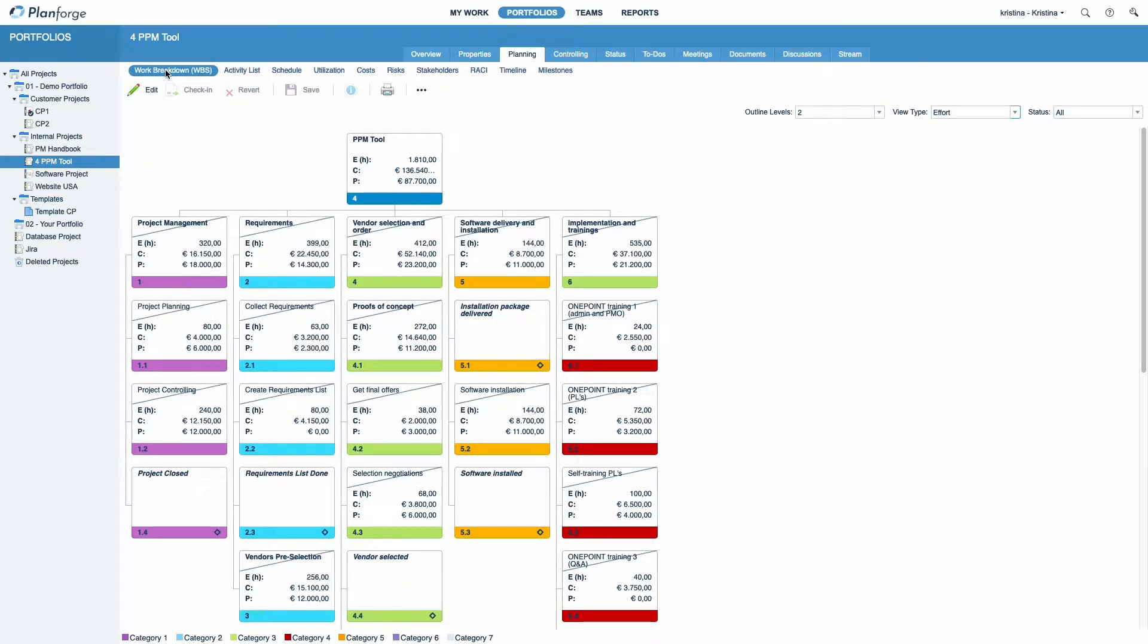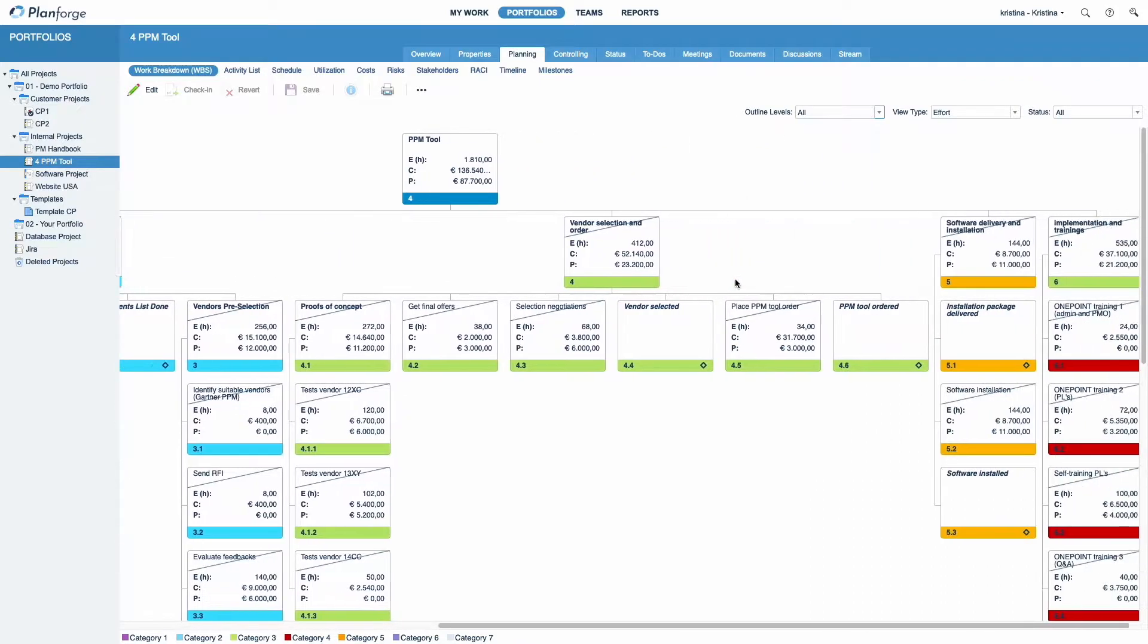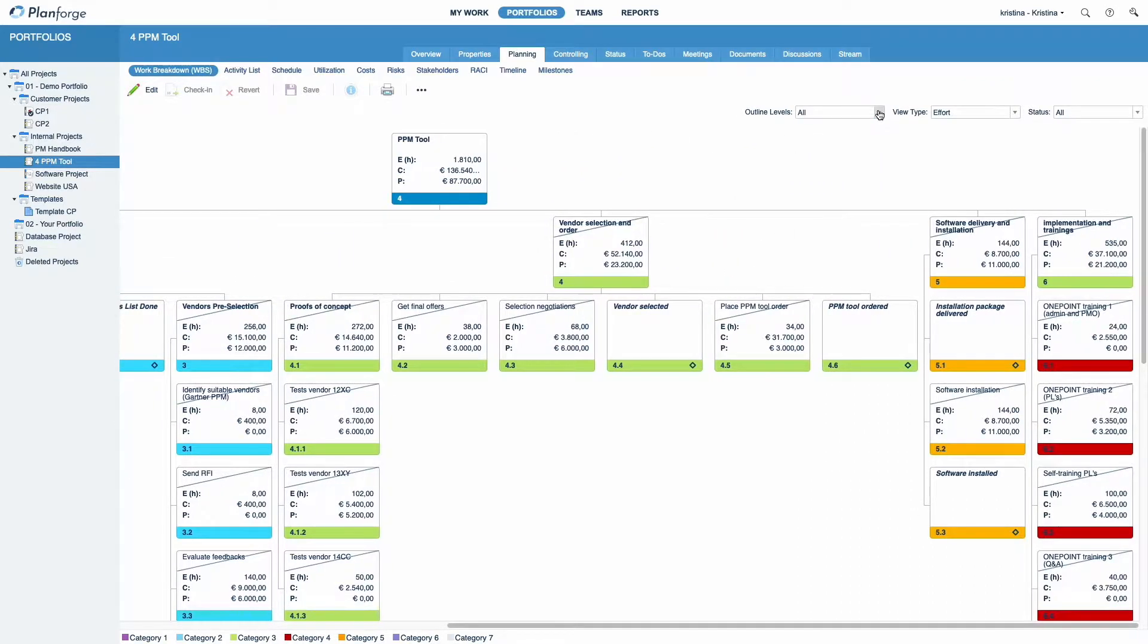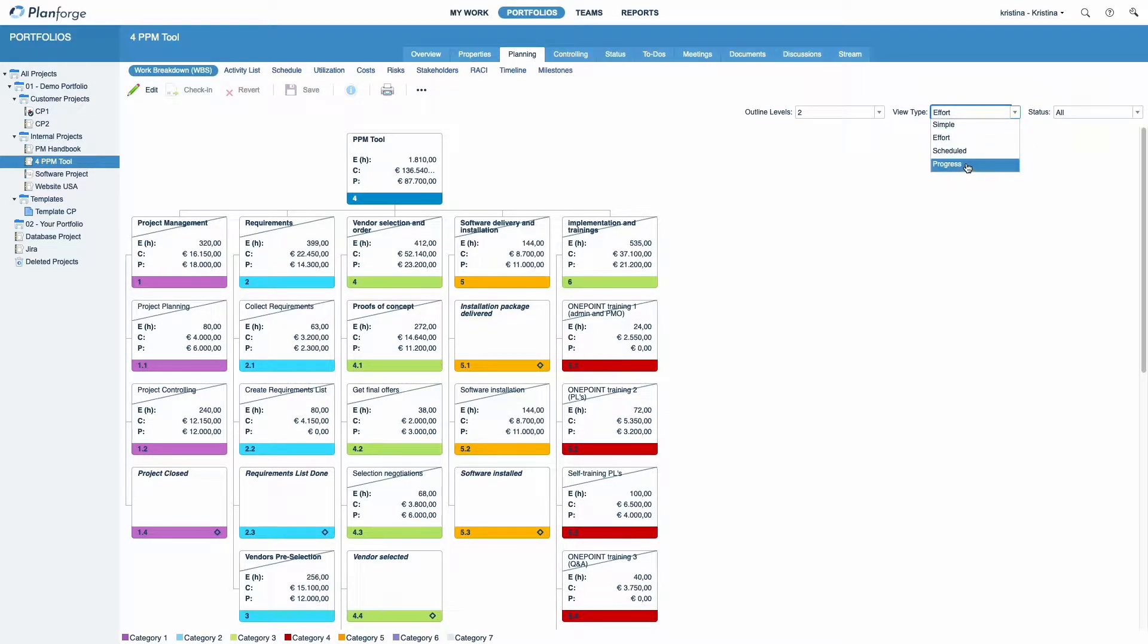If your WBS has more than two levels, you can select the number of displayed outlined levels. Choose between the different view types: Simple, Effort Scheduled, and Progress.